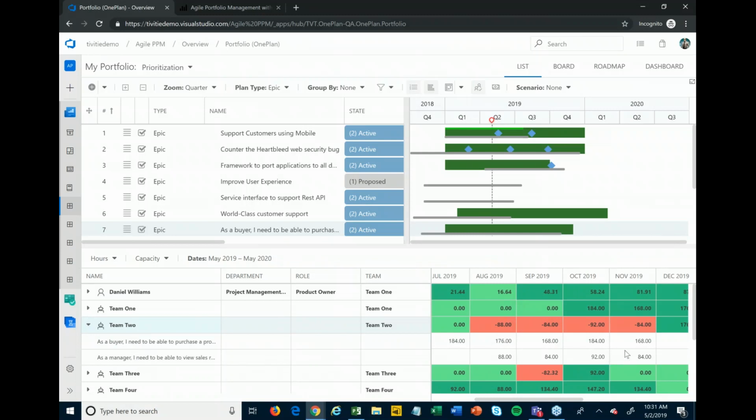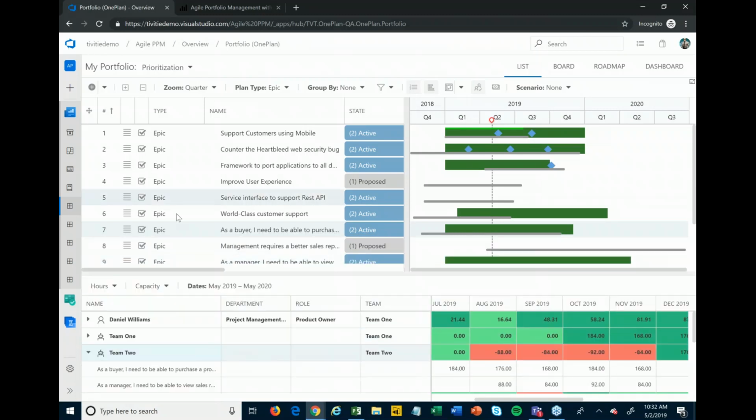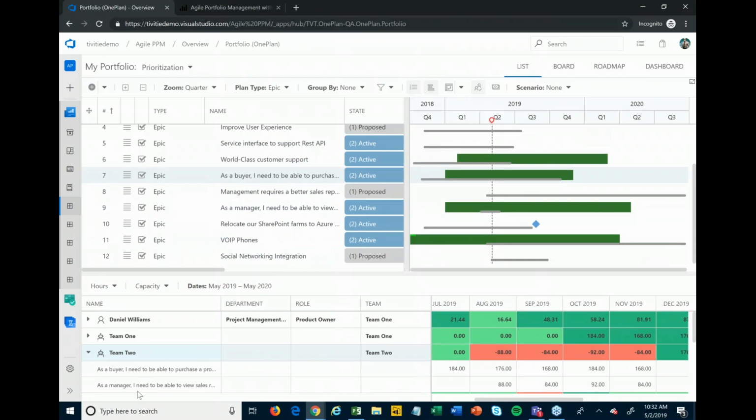So that's a problem. There's a conflict there that we need to figure out how to resolve. Again, we have the same options at our disposal. We can start to uncheck maybe one of these epics and say, what if we don't do one of these, especially if it's lower priority? We can uncheck that, and or we can move things around and see how we can, say, move one of the lower priority ones out a little bit so that there's not that conflict anymore, right?